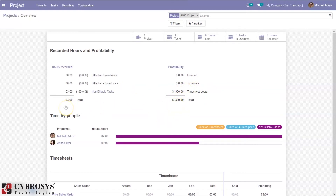We can also analyze profitability with the help of an analytical account. In enterprise edition, you can create and manage analytical accounts, and if you create a project, an account will automatically be created with the name of the project.